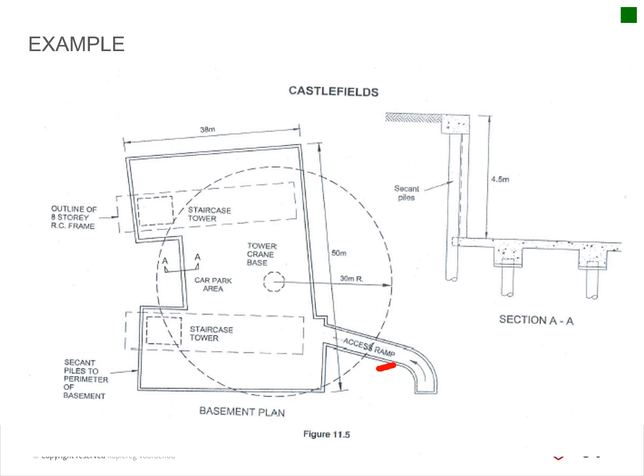Then you've got a second section: your resources, your supervision, your labor, your plant. You list all those items that you need to sequence here, and then they combine the health and safety within this method statement. So you can see significant hazards, and then you've got control measures. So there's the health and safety section incorporated, and then they've got their PPE at the bottom.